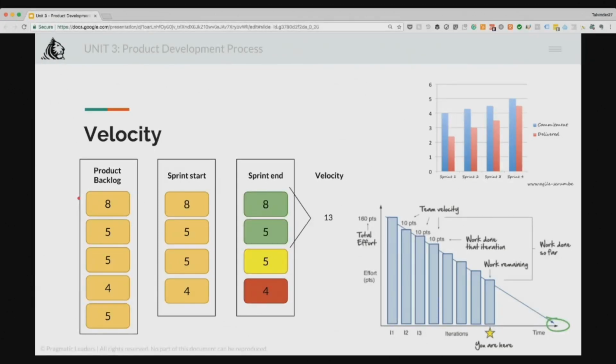So instead of using the number of hours, by using story points, or just giving a number to the complexity of the problem, you're essentially removing the subjectivity that can come along with the people involved, right? You want average numbers. You want a median number, so to say, right? How much complexity can be finished in a certain sprint, and for that the number of hours doesn't help. What helps is actually the complexity. Okay? Because like I said, today it might be complex for me, tomorrow it will not be complex for me because I've already done it once, correct? So next time when I'm estimating, I'll estimate it as a story point 1 problem because I've already done it, I know it, and so it's not complex at all, right?